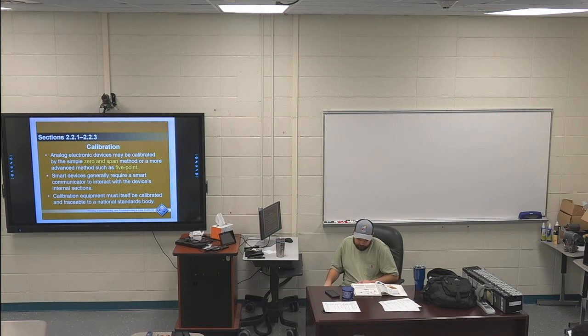Calibrating a loop. I've got the second sentence to the end of the paragraph highlighted. I have a couple questions coming out of those sentences. Calibration should not be confused with loop tuning. They are completely separate stages. The loop cannot be tuned until it has been calibrated. Tuning is covered in a separate module of this curriculum.